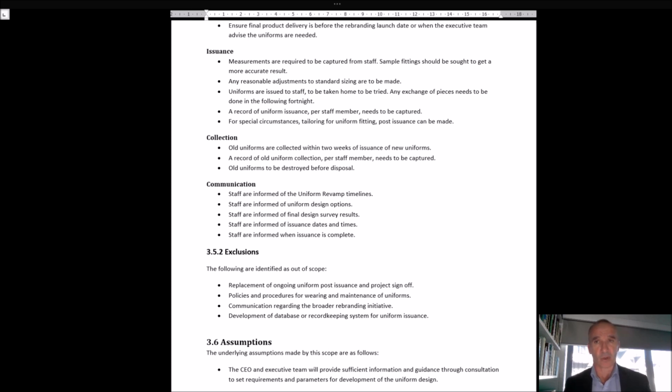If there's scope creep during the project, that is where more stuff gets included into the scope, particularly, then I'll get in strife because I don't have the resources, because my resources have been allocated to the scope that I've identified. So if all of a sudden I've got creep, I'm going to struggle to get on my targets and my objectives. So this document becomes the basis to which I will stand as a project manager and say, this is what was signed off. This is my accountability. I'm happy to do the creep if I am. I'm happy to do those changes to the scope. However, I need you to sign it off, sponsor. So I go back to my manager.